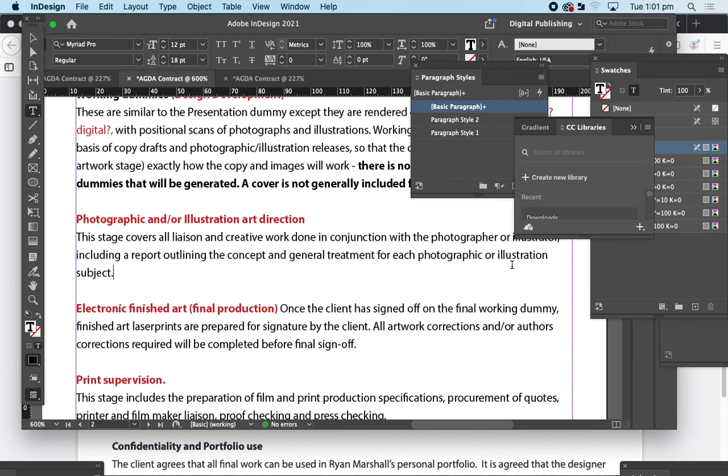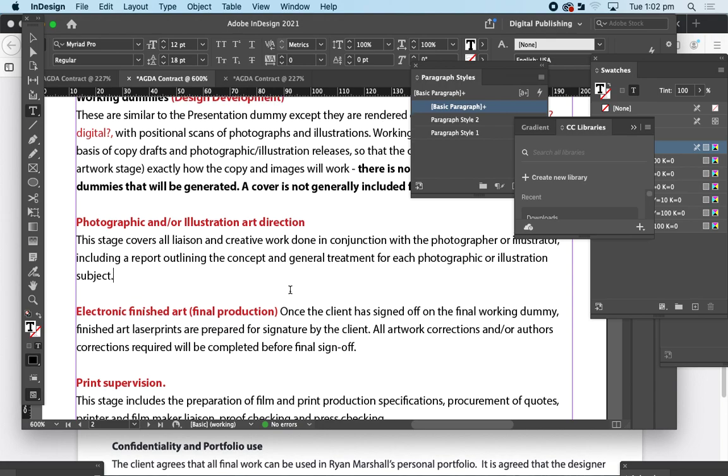Well, you have things that are agreed to in this contract. And then when we get down to the terms and conditions, you'll see there's an extra work part. And that's where you would add on anything that wasn't agreed to in the original contract. Yep, so if you find that an extra 10 images were needed, they weren't agreed to in the contract, then okay. But as long as you have stated the amount of imagery and how many photos, obviously that's going to be on the invoice. So it's a billable item. Yeah, so it could expand or contract as long as you have a clear item here for it.